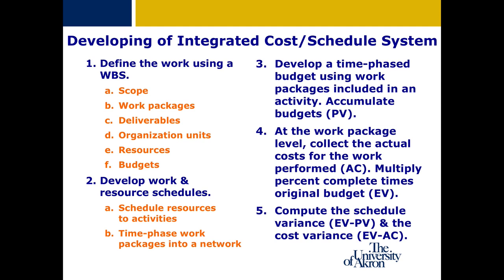The final tasks are to collect the costs for work actually completed at the end of a work package or task — called the actual costs, or AC. The key is to determine the percentage of work completed for tasks scheduled in the time phase being measured. For example, if the percent complete at the end of a reporting period is 75% and the plan value was $40,000, then the earned value is $30,000. This is calculated by multiplying the plan value by the percent complete: $40,000 × 0.75.